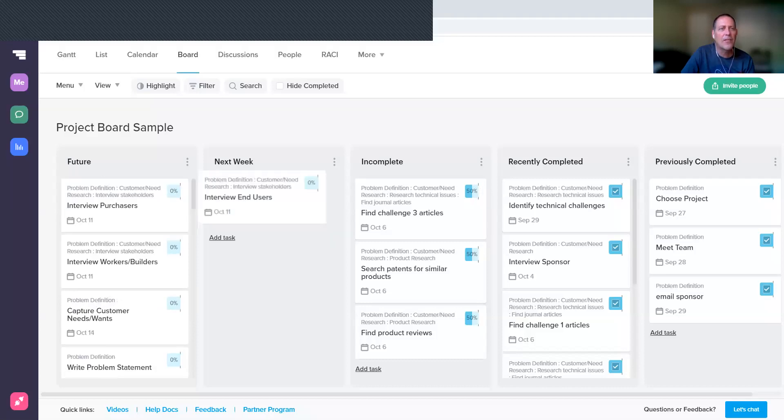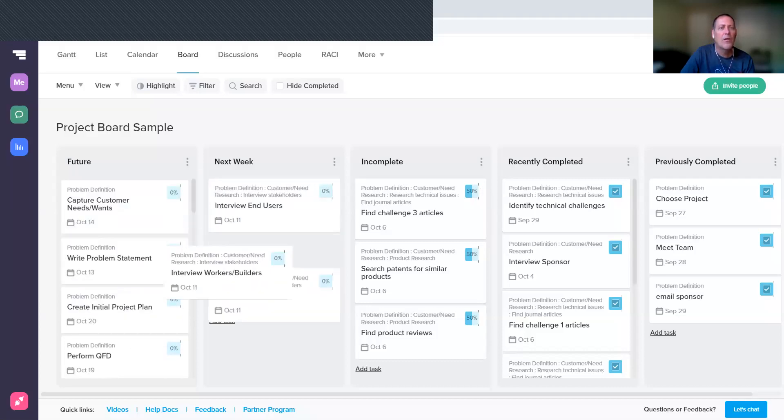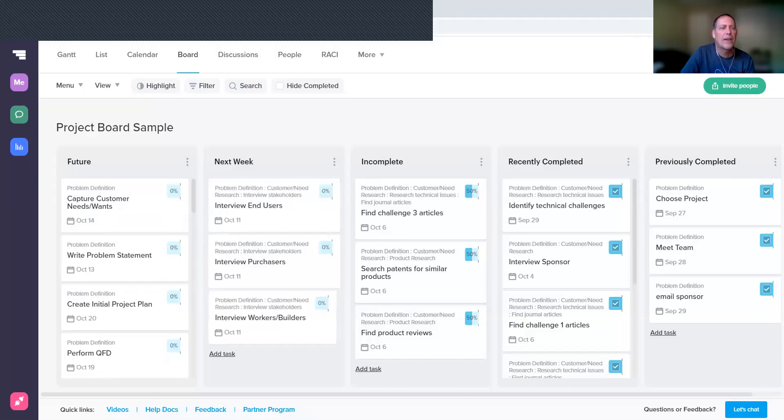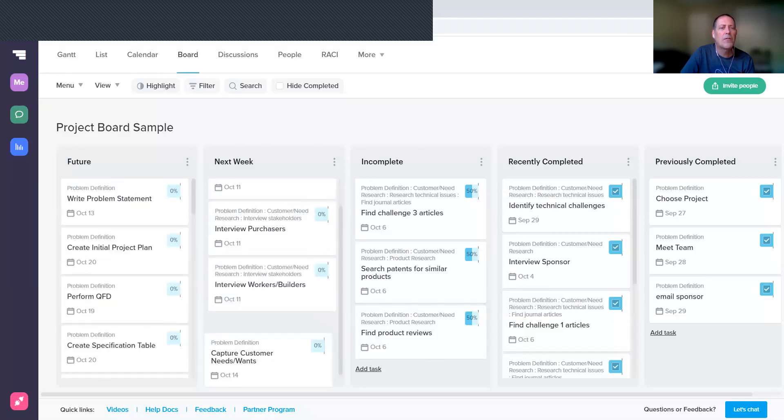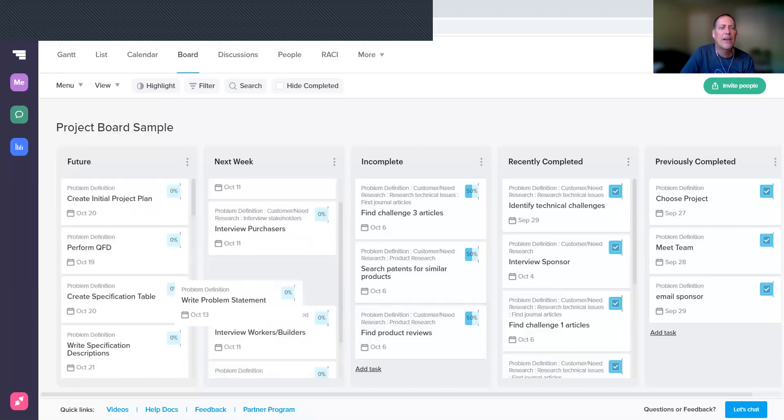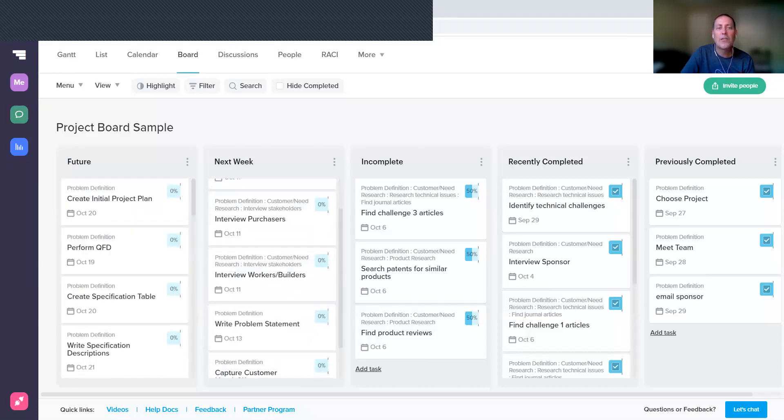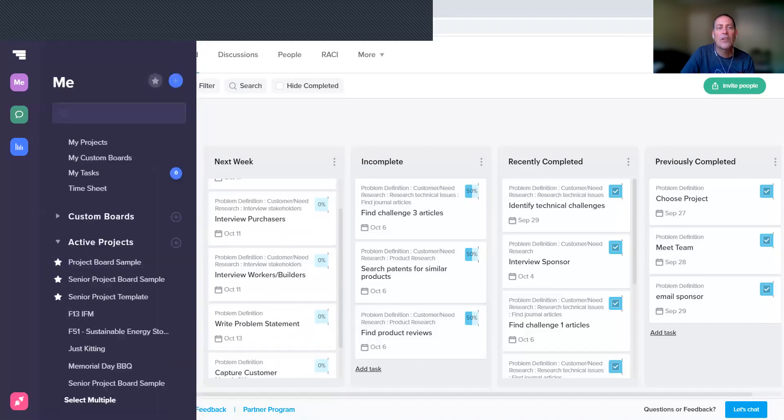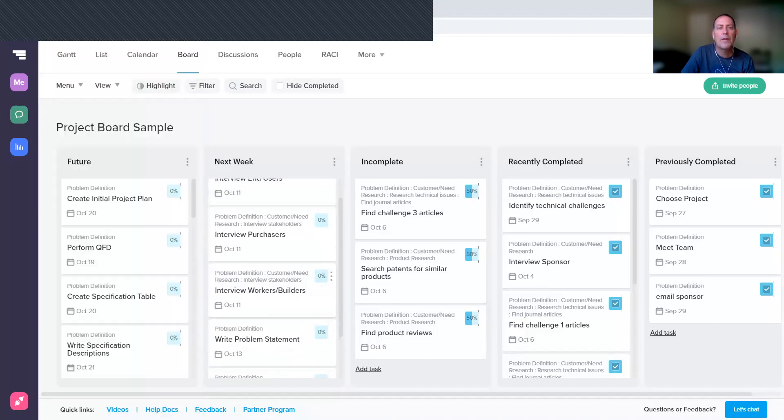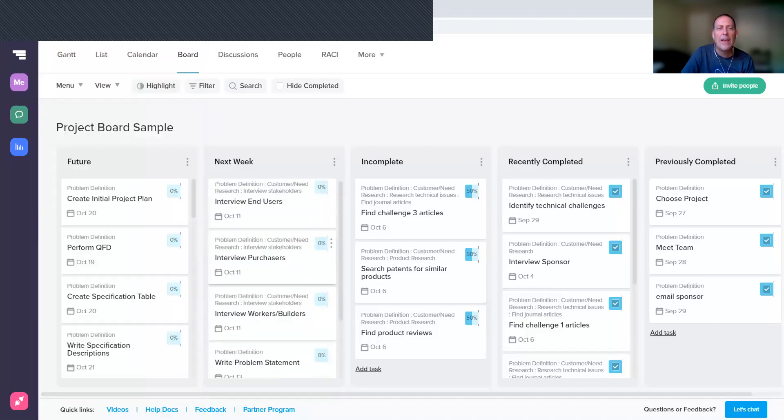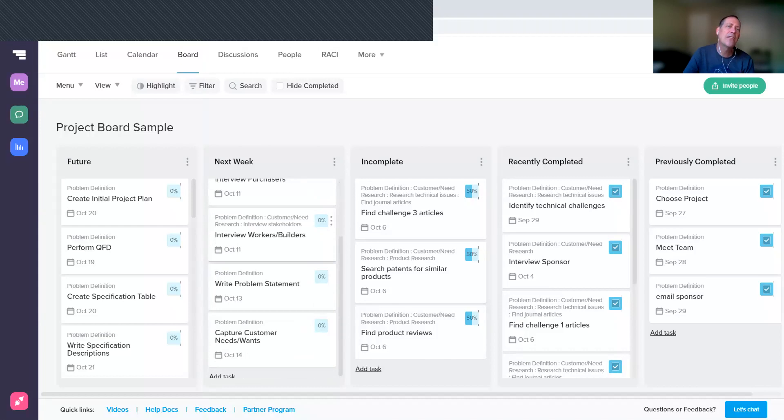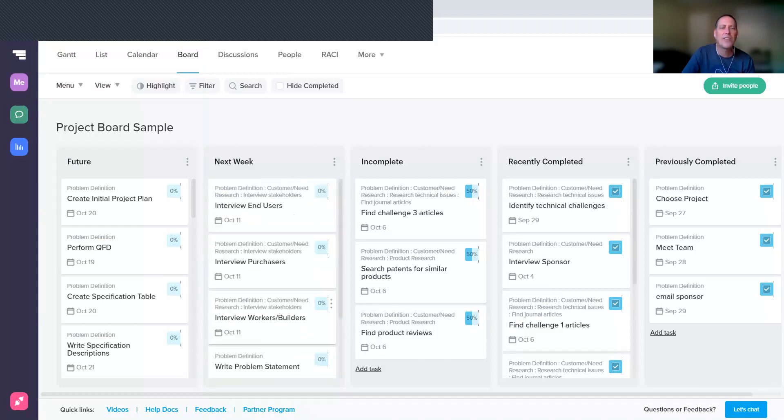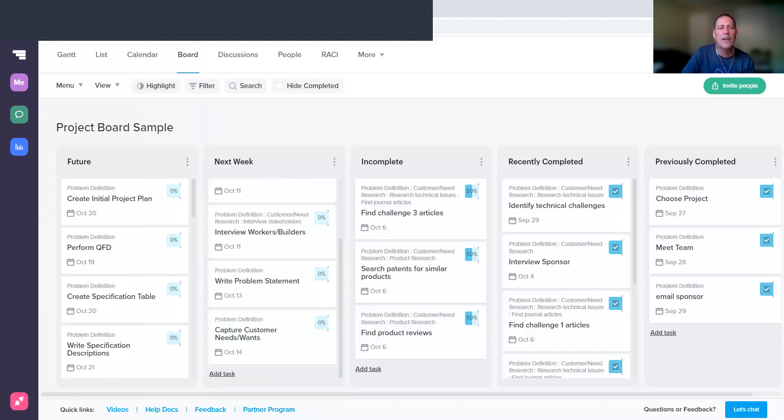Final thing then is to identify those tasks that you're going to do over this next week, and so I'm going to pull some over here just based on the dates. And that's a good way to start—if your Gantt chart is well set up, then that's the main thing you do. But then you look through the tasks and you think, is there anything else that we need to be doing this next week? And if there is, you can add the task right here, and again, if you add it here then it will also show up on your Gantt chart.